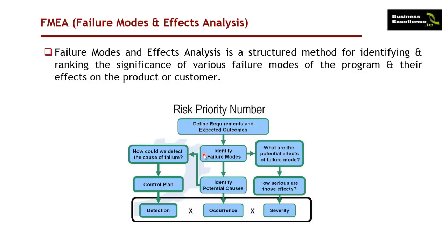The next thing we look at for each one of those failure modes is, what is the likelihood we are going to detect it beforehand, or what control is in place so that if it does happen, either it fixes itself or it has no consequence. So the third part of the jigsaw is detection. If it is absolutely detectable beforehand, we give it a 1.